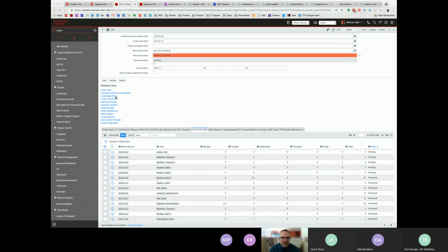But one of the things that we can do, and we're trying to look at doing, is you can create an agile phase in your project and assign a couple of tasks to that, so they can bill their time against those tasks. So they're still doing the resourcing part there, but they're actually managing all the different user stories and stuff separately in Jira.